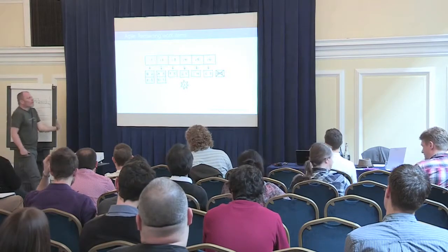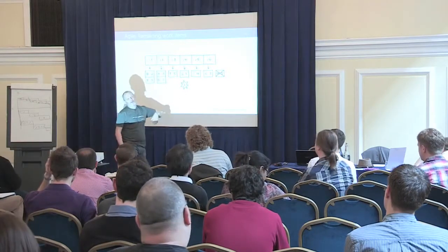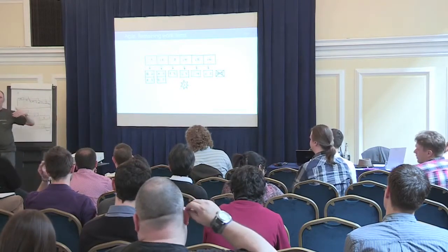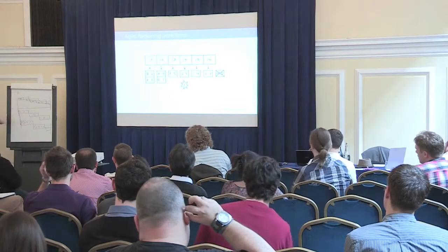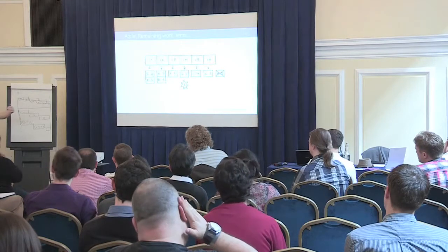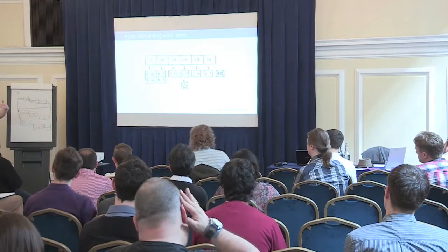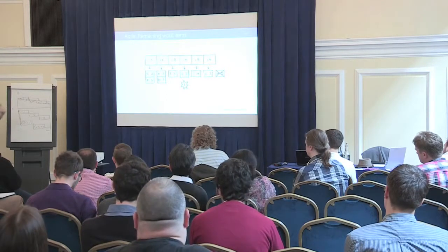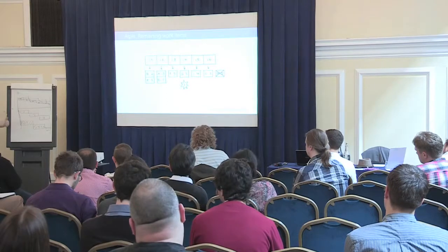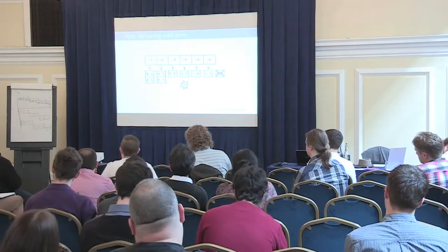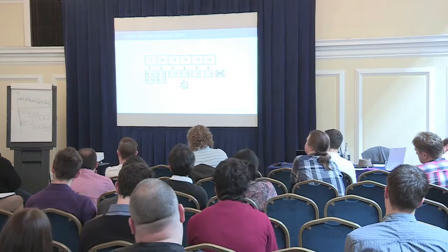So for every work item that we got onto the backlog, the client decided about, okay, is it worthwhile to do a next iteration? Because eventually they could do like 25.7 points per iteration. So doing an extra iteration, we knew exactly how much that would cost, right? So they decided every iteration again whether it was worthwhile to do the next iteration. And after 2.5 years, they stopped the project, right? We were done. There was nothing new anymore that we could do that actually had more value than what it would cost to do it. So that's another way of looking at it.